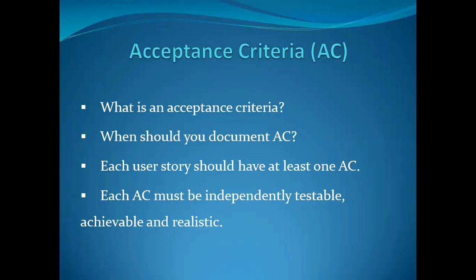Sometimes, depending, they may ask that in the first 2 weeks you write your user stories and requirements. The third week you may use to document your acceptance criteria, because you have a lot of things, and if you happen to be the only one working on that project, you may have to write your acceptance criteria after submitting the requirements.